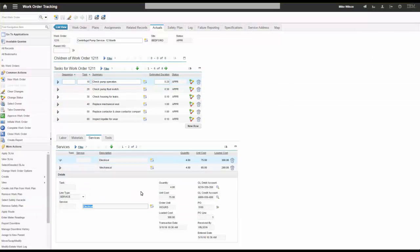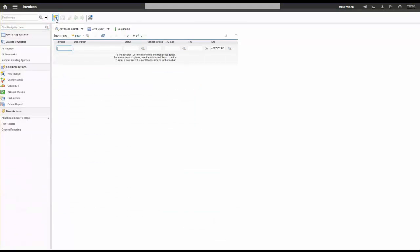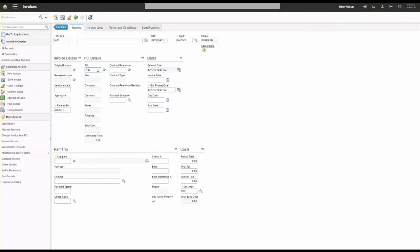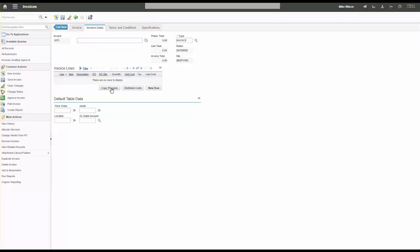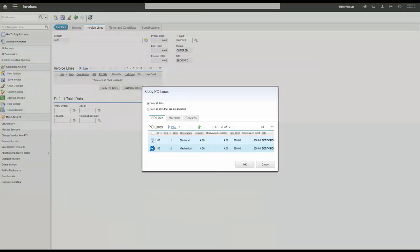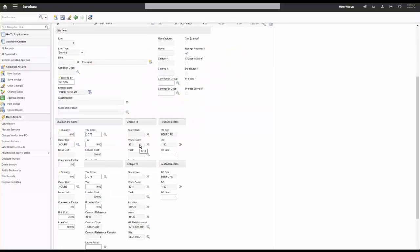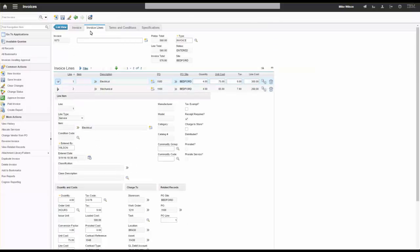We are keeping costs associated to the work order. It might be easier because it's all in the planner's hands — they send a PO out, someone does the work, the planner receives the services to confirm the work was done, and that information comes across. To finalize, rather than having an invoice created automatically, we create a new invoice and reference the approved PO. It populates the contract and vendor information. I go to invoice lines and copy the PO lines — two lines, both received and available to invoice. Expanding a line still shows work order 1211 with all the charge information.